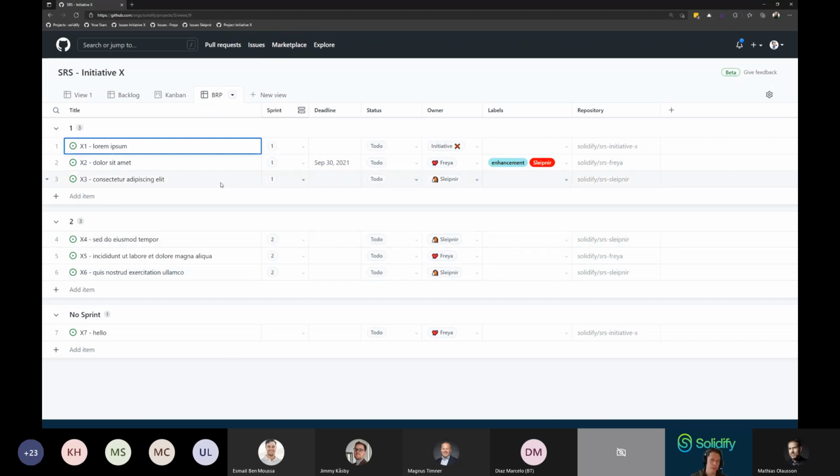But also what we've done here, because I said, well, dependencies, that's kind of what will ruin the day for you. So we need to keep track of dependencies, and we need some kind of agreed upon convention on how to indicate or visualize dependencies. So what these teams have done is that they agreed that if we have an item that is dependent on another team, we're going to add that team name as a label in red to indicate that we're dependent on this other team.